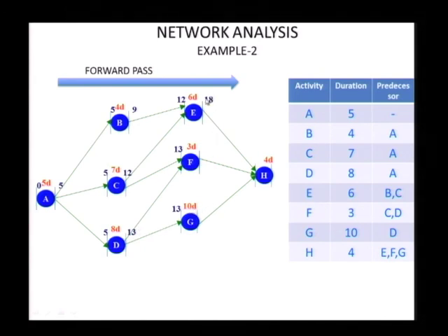Now E will finish at 18, 16 and 23. So now H has 3 predecessors, and we have to obviously start with the last one, and then it finishes at 27. Okay, any questions?